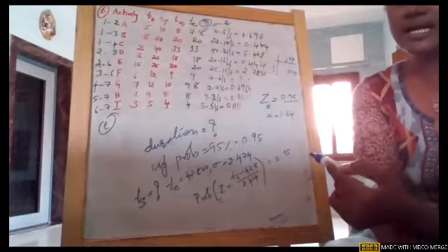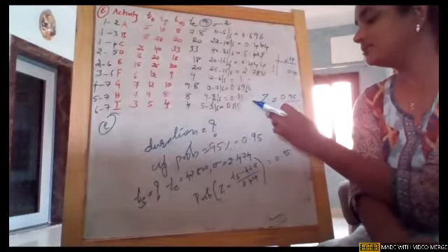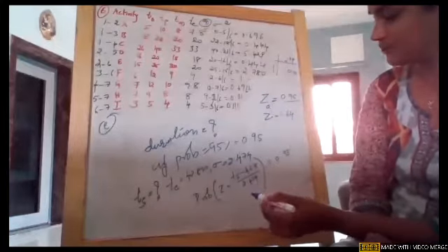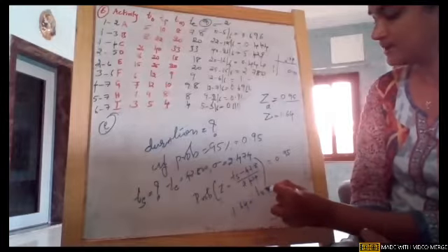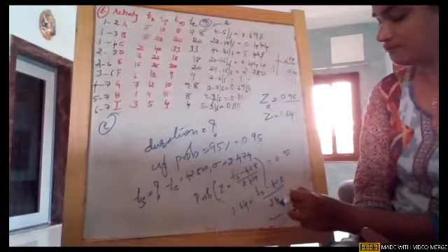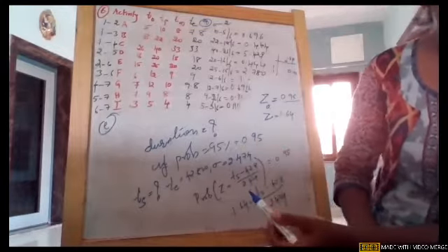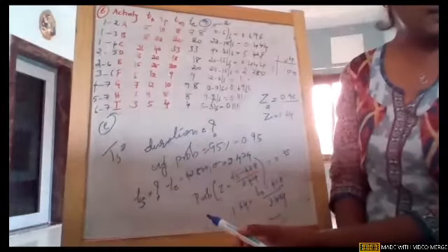In that particular scenario, we need to do it in reverse. So the Z value is 1.64, that means the table value is 1.64. So 1.64 is equal to TS minus 42.8 divided by 2.474. After solving and calculating, we got the duration. What did we get TS as?